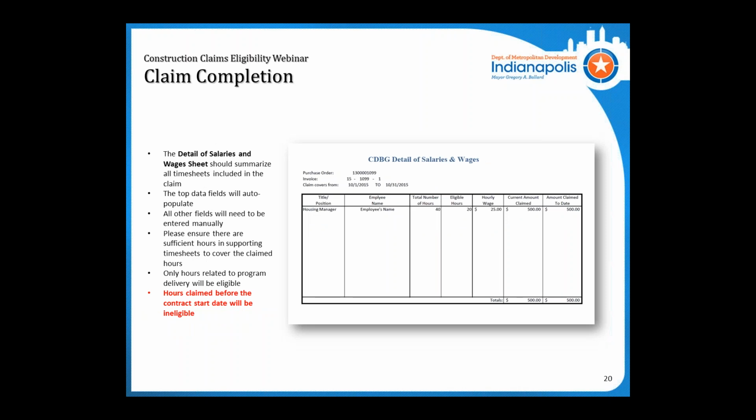The details of salaries and wages. This is for any projects where the construction management or project management is done by a project sponsor staff. So if one of the staff members is a housing manager and is overseeing the homeowner repair, that is an eligible expense for salaries and wages, and that would go under program.